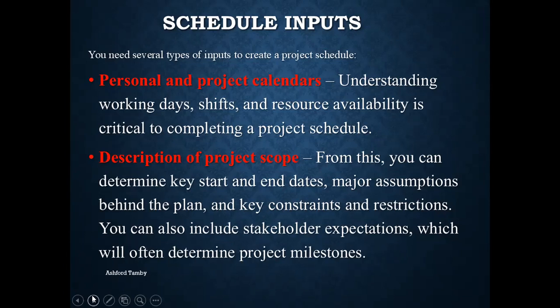Trinidadians, if a holiday lands on a Thursday, they take the Friday off. If a holiday is on a Tuesday, they take the Monday, long weekends. We like that long weekend thing. So as a project manager, you need to take stock of and understand how resource availability will be affecting your project.